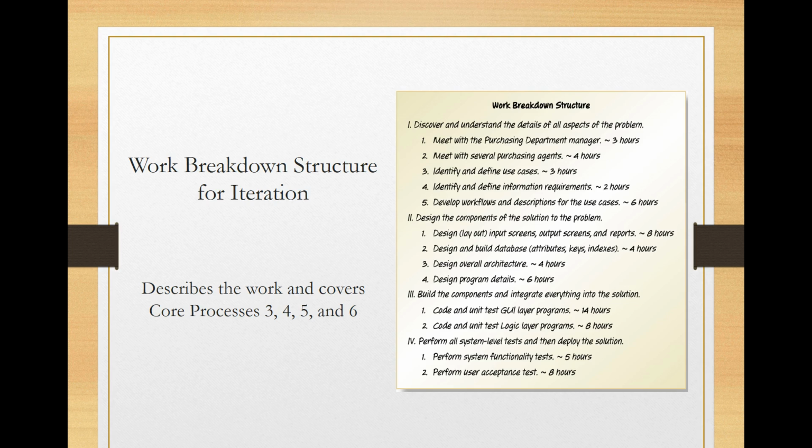So think about this. If I say you've got to write a 10-page paper, can you tell me exactly how long that's going to take to write a 10-page paper? No. But if I break it down and I say you need to find 5 sources and research a topic, and then you need to create a rough draft, and then create a paper, are those small enough that you could start thinking about, I could put a number to each one of those? Yeah. And so that's what we're doing here is we're breaking it down into smaller and smaller pieces.